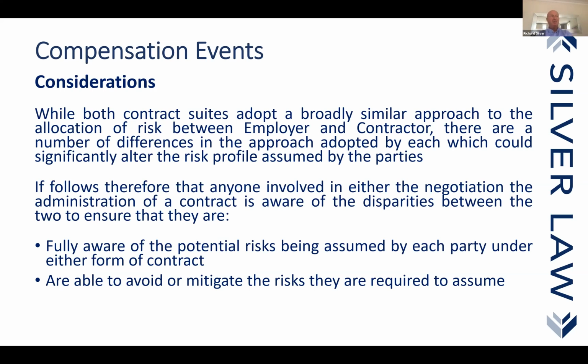What you need to state is we submitted a quotation. I mean, we've got two ones. One in regards to whether an event is or is not a compensation event, and one is whether or not a quotation has been accepted. So what I would suggest is something along the lines of: an instruction was issued on such and such a date. By such and such a date, we advised that this was a compensation event. You have failed to respond within the period of whatever many weeks it is.